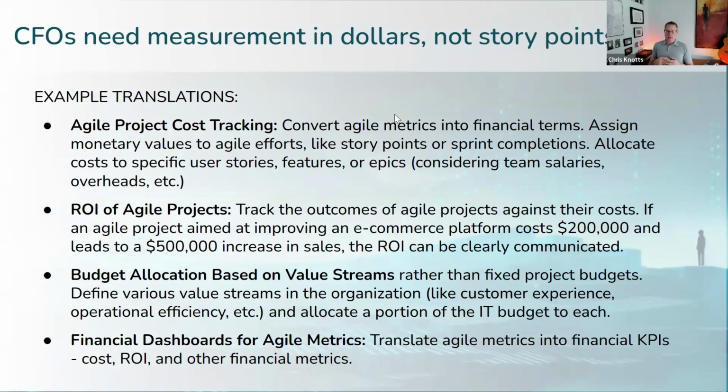So the first issue is that annoyingly, a lot of times at a team level or a Scrum level, we start measuring value in things that are really useful for running work in an agile way at a team level, like story points or sizing or a burn down or whatever. Well, that's great for helping the team get their work done in a more efficient way, in a better prioritized way. But it stops short of actually translating the value of that output to terms that really, at the end of the day, the people who are making financial decisions about what type of work to invest in, what in our portfolio to prioritize, those types of agile metrics don't give those folks the information that they need to effectively manage the portfolio at portfolio scale. So at team scale, this stuff is good, but it's not a solution at portfolio scale.